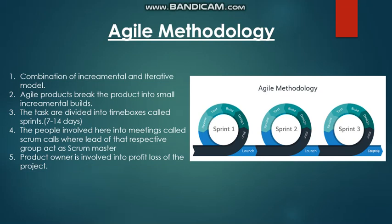In Agile, you are simply dividing your product into different sprints. Each sprint will have a cycle of flow: planning, designing, building or coding, testing, and reviewing the product. A new phase has been added here — the review phase — where the customer reviews the product generated as part of Sprint 1. Then the process moves to Sprint 2 and so on.